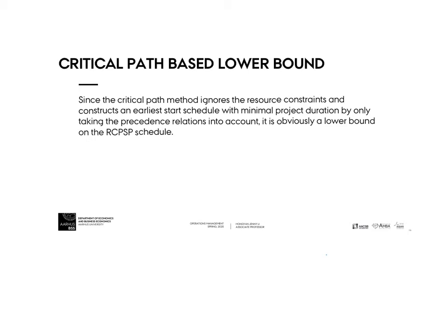Based on the name, you can probably understand. If you know the critical path, we basically ignore the resource constraints. So you just implement the critical path method. Ignore the resource constraints, then the solution will be the length of the critical path.